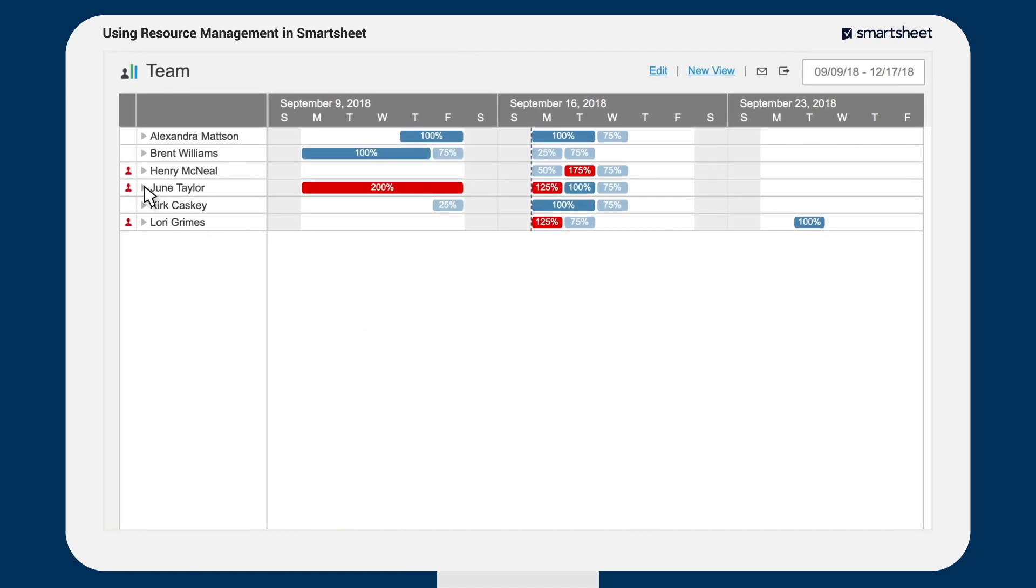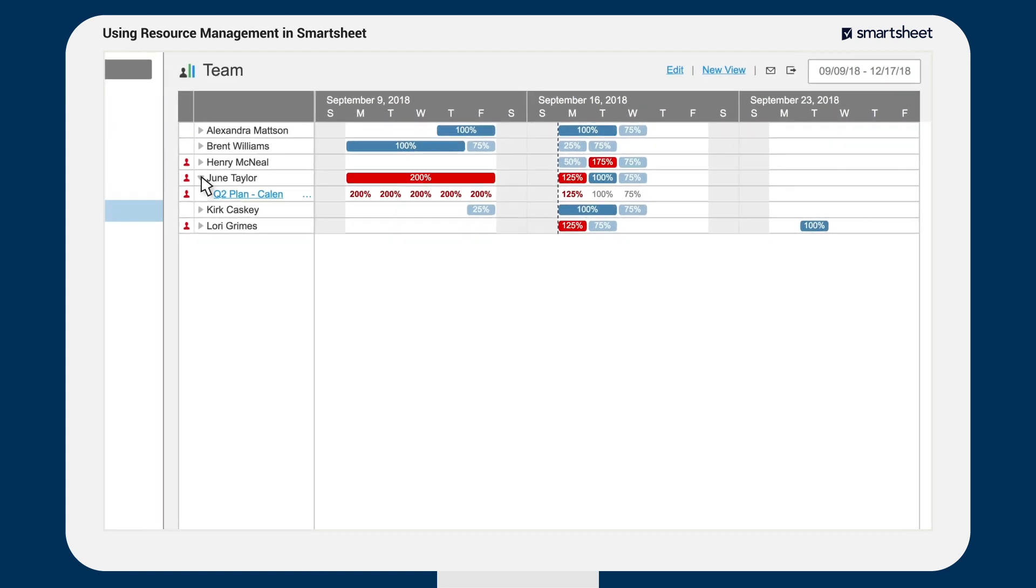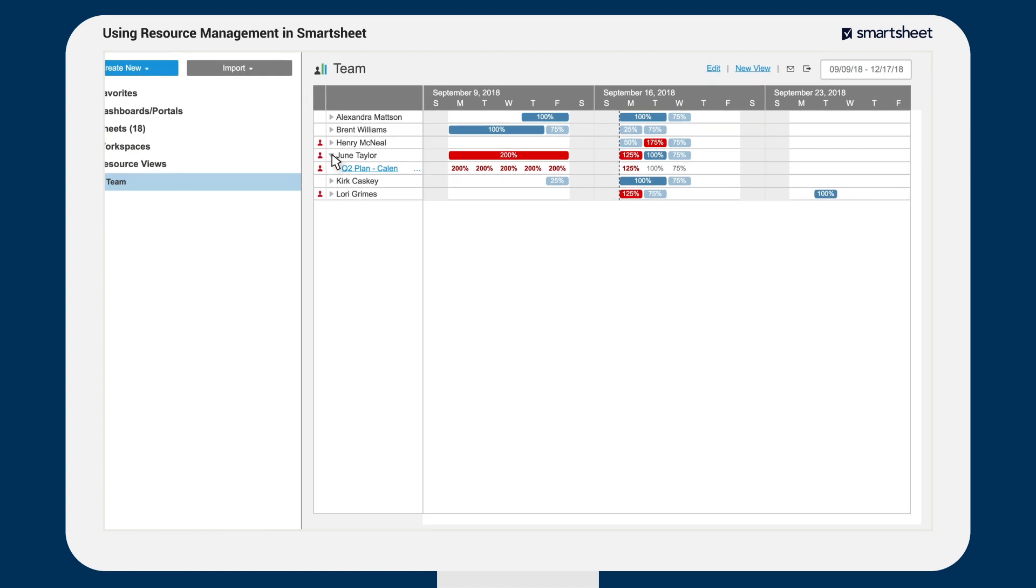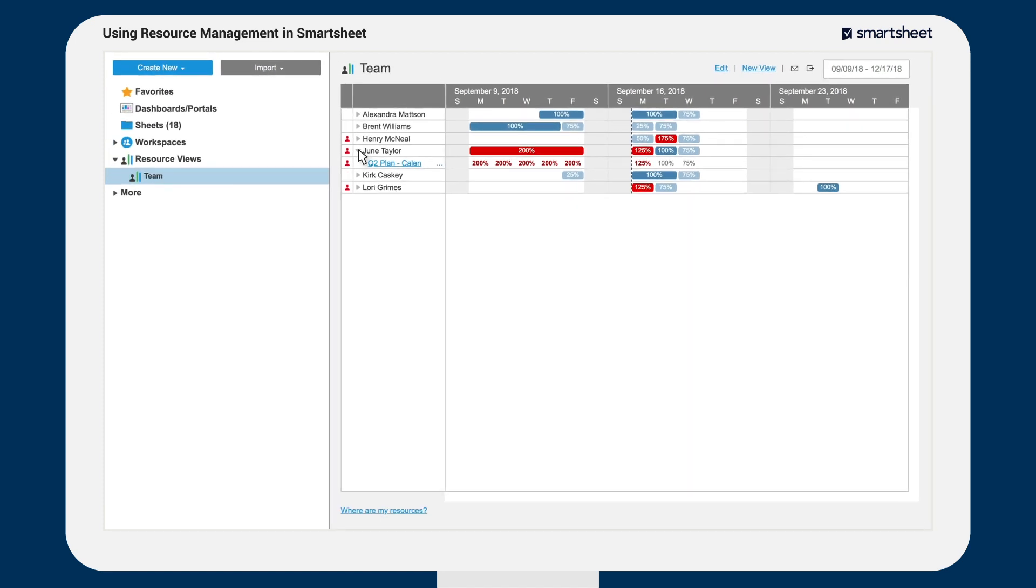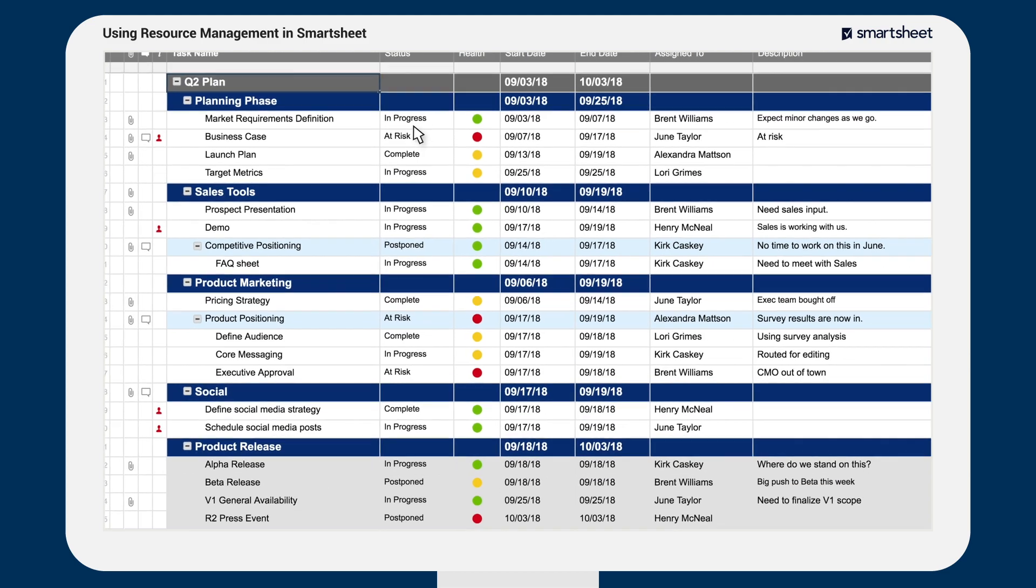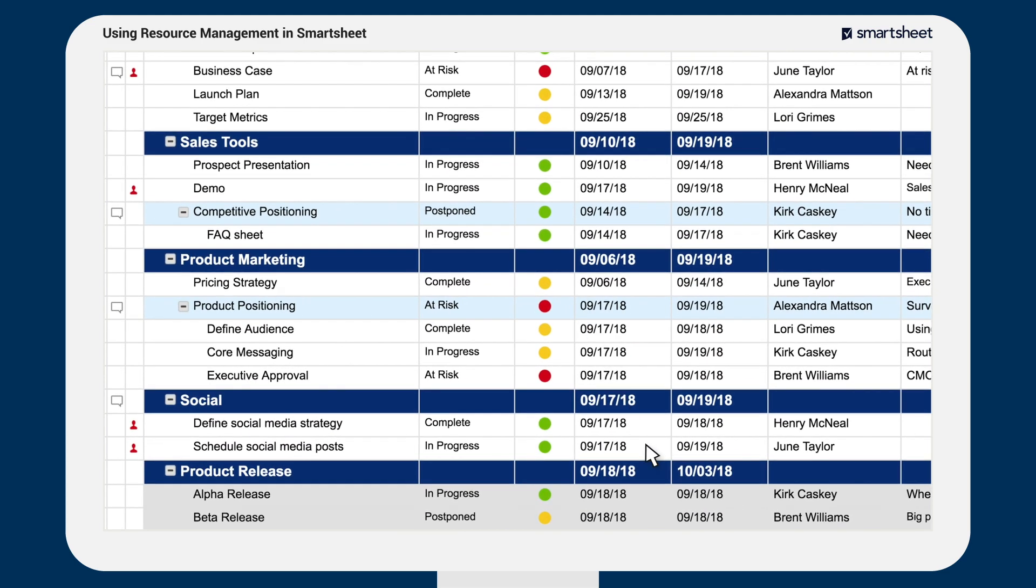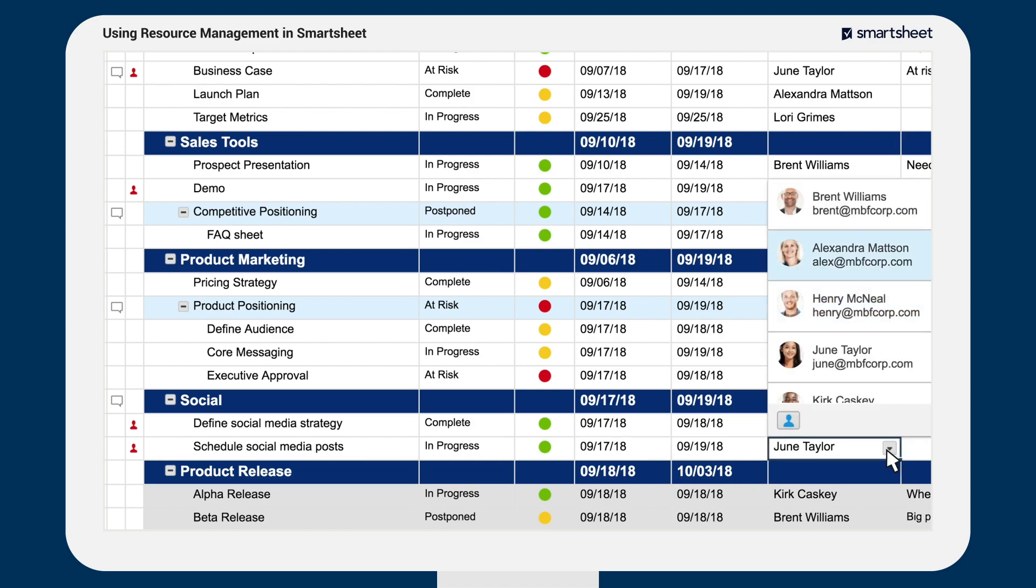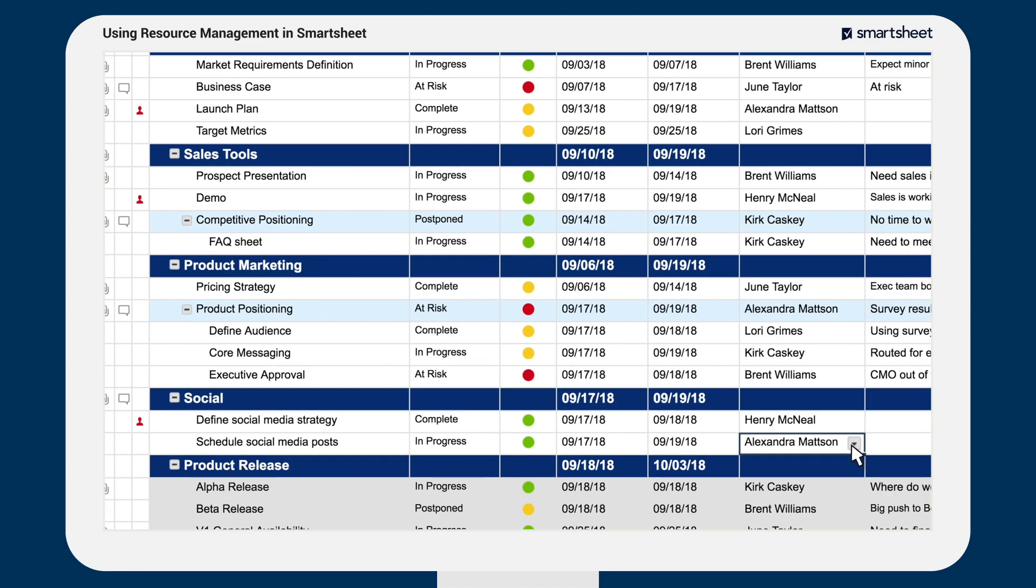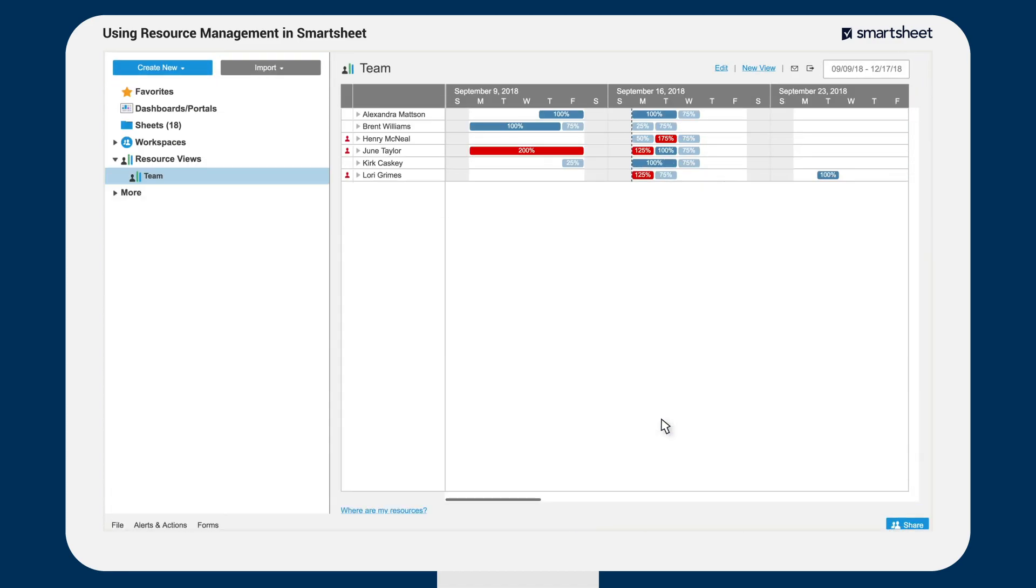You can drill down from any view to get more details about resource assignments and over-allocations. If a project you've created or been shared to is causing an over-allocation, you can go directly to that sheet and resolve the over-allocation by making adjustments to start dates and dependencies, reassigning tasks, or adjusting allocation percentages.